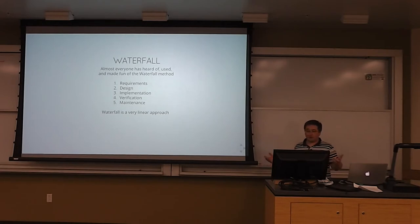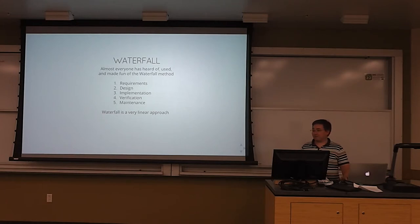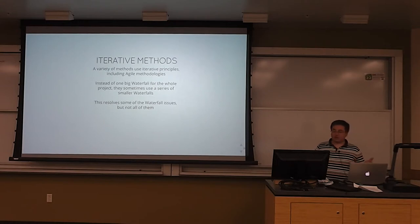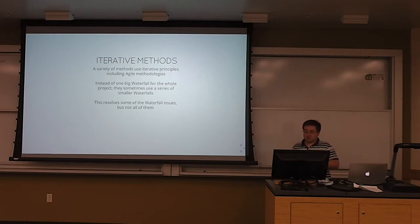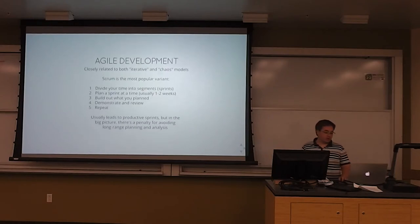Everyone heard of waterfall? Basically you figure out the requirements, you do the design, you implement it, you verify it, and then you go into maintenance mode. It's very linear. There are some obvious downfalls to that — if you do any one of those wrong, there's no accommodation for going back and fixing it. That gave rise to iterative methods that do go back and revisit earlier stages. Agile is a form of an iterative method.